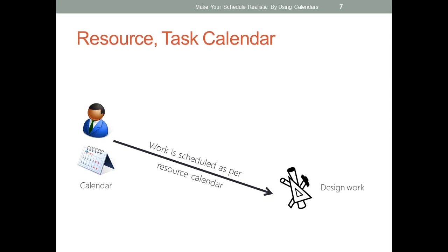Now let's take a complex case. Let's say we have an activity called server downtime or server repair or server maintenance. You might know that these activities cannot be done during the normal weekdays, which is Monday to Friday, because we have certain procedures that need to be followed for that. So for a task like server repairs, I can have my own calendar, which is called a task calendar. This calendar is going to define when this task can be done, from what time to what time.